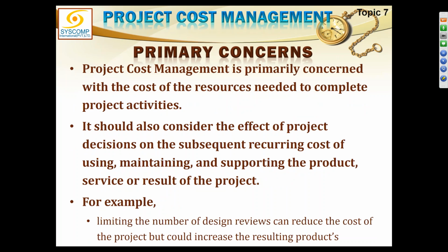Project cost management is primarily concerned with the cost of the resources needed to complete project activities. It is not the money you actually need; you need resources, and you have to pay for those resources. May they be human resources, machines, raw materials or whatever, they will cost some money. That is exactly why you need money. So you estimate the resources first and then allocate cost according to it.